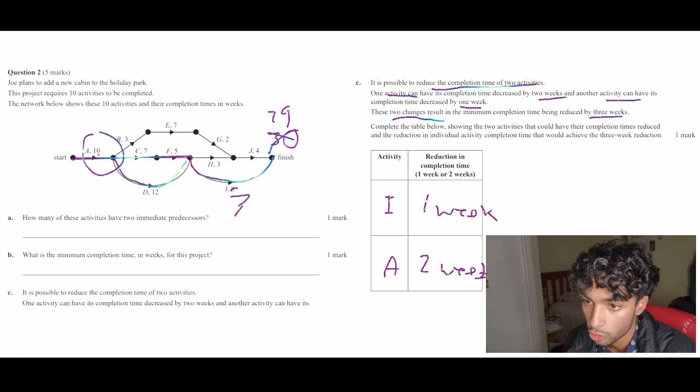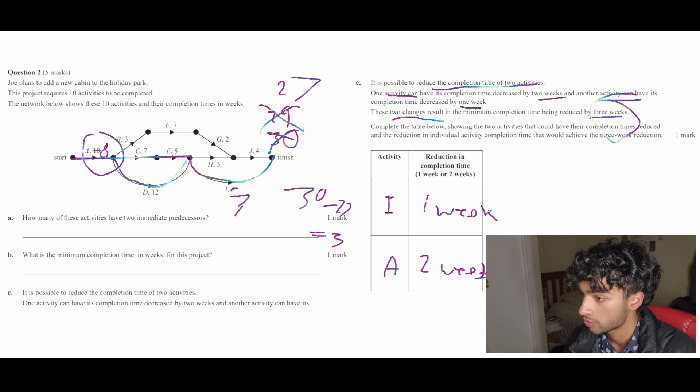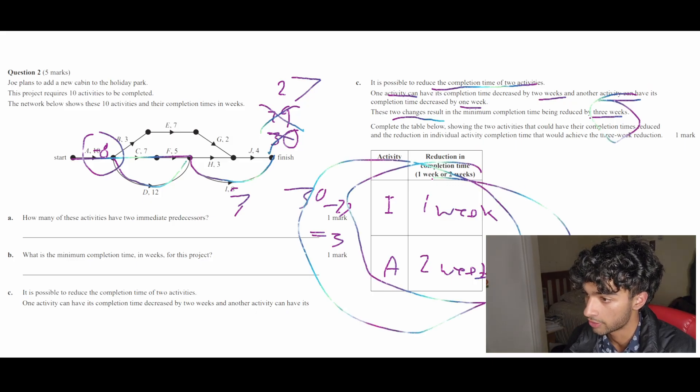And if that's two weeks, that means A10 becomes A8. And therefore, the overall completion time is now 27. So 30 minus 27 is indeed three weeks. So this is our final answer.